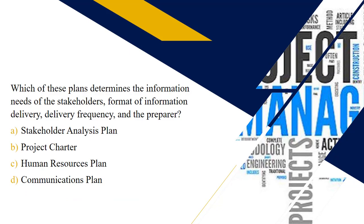Next question: which of these plans determines the information needs of your stakeholders, the format of information delivery, the delivery frequency, and the preparer? The only option that makes sense is the communication plan. This is where all the elements of the who, the what, the when, the where, and the why of your communication needs are all documented.